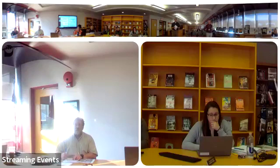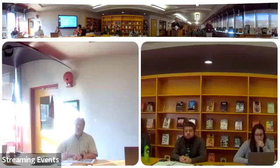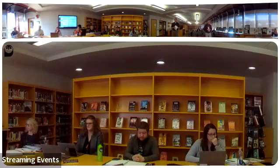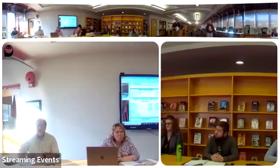The rest of the room should be able to build out. If we've got to wait for abatement till school's out, that may just mean we kick everybody out of the space for 3-4 days, the amount of time it takes to do that abatement, and then allow people back in to continue work. So it's not a huge roadblock, but it is a concern. Okay, but it won't push things out drastically. Right. Either way you have to go. Yeah, and they have, as Sean mentioned, they have other work to do.